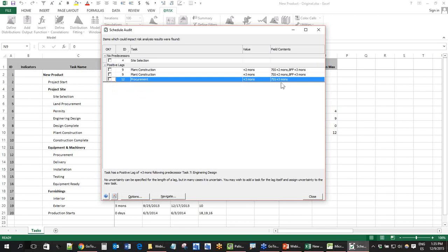If you don't do it, what you're basically saying is that this task and the previous task, or the next one, in this case this is a start, are going to wait exactly 3 months every time, right? And you have to have a very strong reason for doing that, now that you have a tool that's going to make your life easier and let you define uncertainties for the times, right? So it's a strong definition. For example, in the case of lags, if you have constraints such as no later than or start no sooner than, that's also going to appear here.